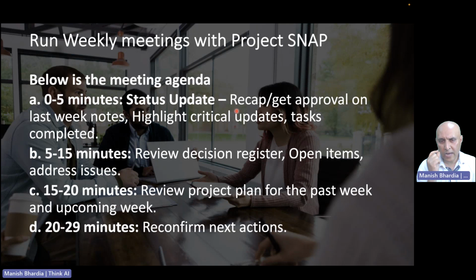In the last minutes, when I say reconfirm next actions, do make a habit of stopping the meeting in the last 10 minutes or 5 minutes and recap. You have to recap, because we can make a practice that we just need to listen to the last 5 minutes and we know what needs to be sent in the meeting notes.